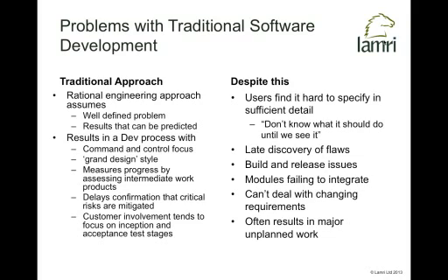One of the challenges of that approach is that it delays confirmation that I've mitigated the absolutely critical risks. To a certain extent, in the software world, it's only the delivery and production of working software that actually demonstrates that we've got something that works and that meets our customers' needs.